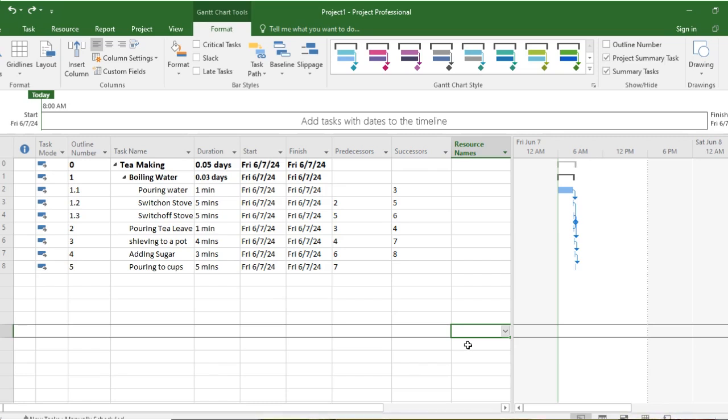When you move any task, change the dates or change the durations, all other tasks which are dependent on them, like the successors of those tasks which are modified, are arranged automatically by Microsoft Project. It's an automatic calculation by the computer. You have no role in that.